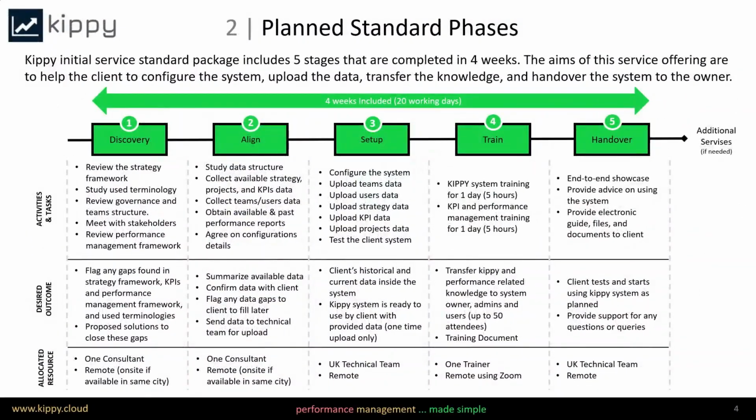So these are the 5 phases in a summary. It's around 4 weeks, 20 working days. We have the discovery phase that focuses on analyzing what you have already. Do you have any gaps? Do you have issues in terminologies? We will meet the stakeholders to understand the business requirements. And at the end of the day, we do recommend a few items and activities that need to be addressed by the team.